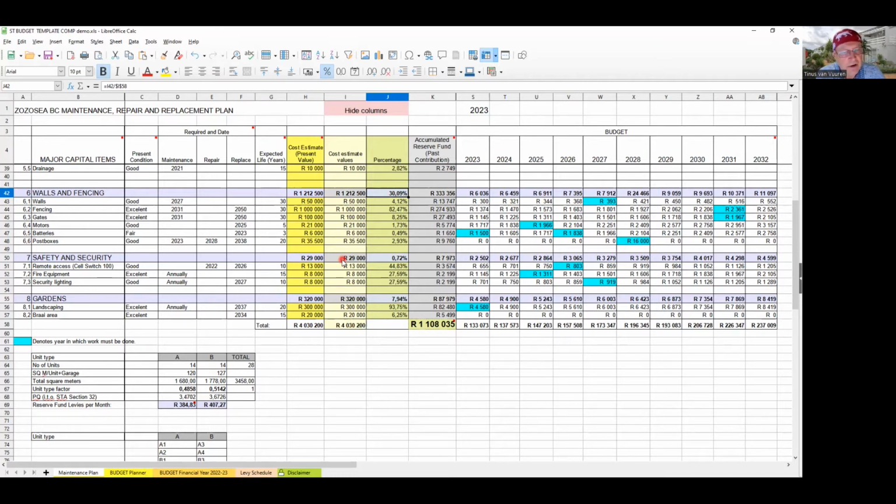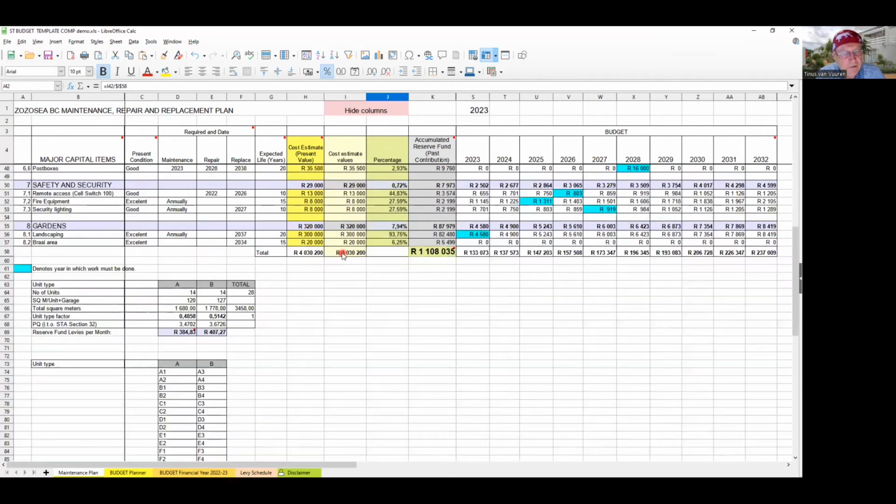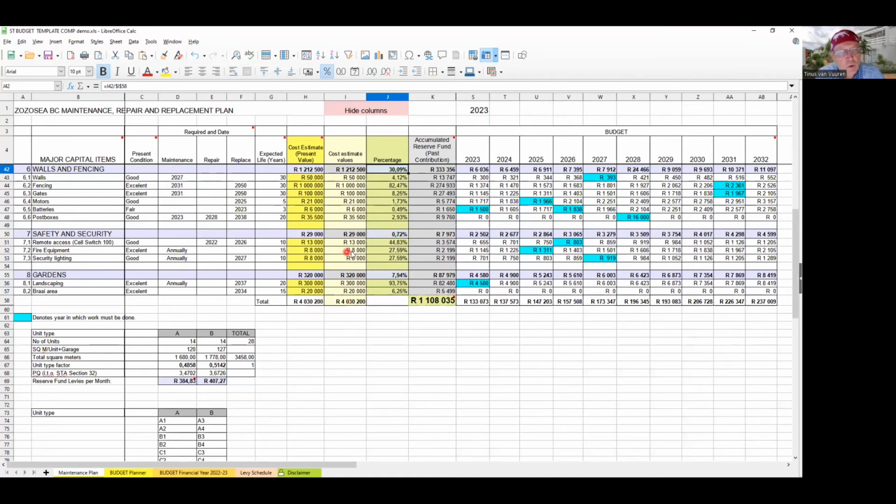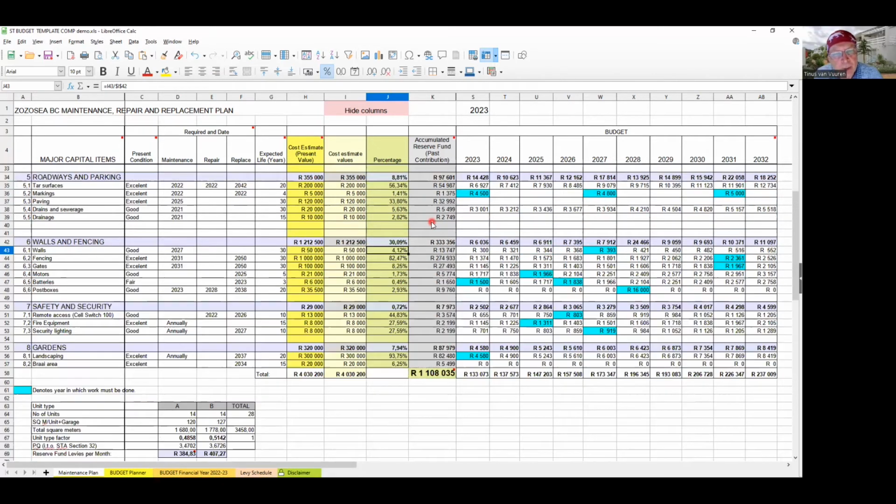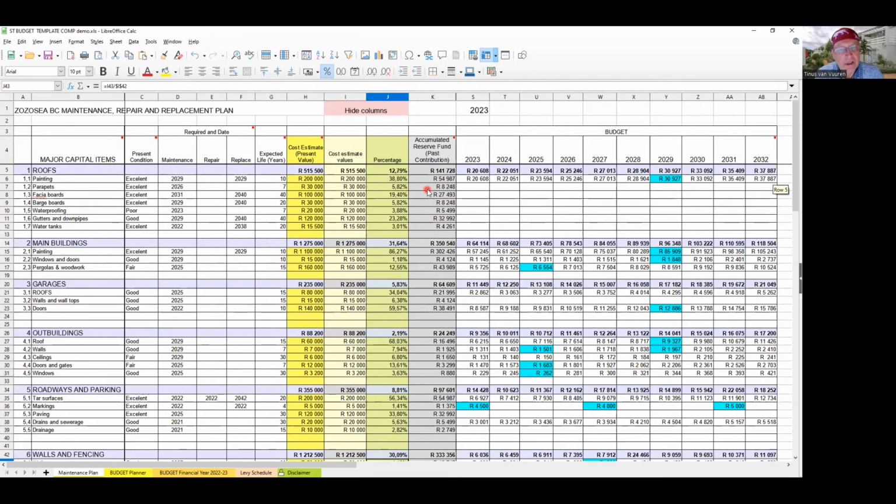These values in gray are the percentage of the total. But then you also want to calculate the breakdown items: what percentage is each of that total? And it will give you these percentages. 1,000 over, so it's 1 million over 1.2 million. Yes. So then it just applies these percentages to this figure here, and it will automatically populate this for you. Very simple.